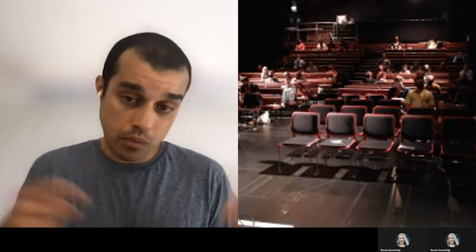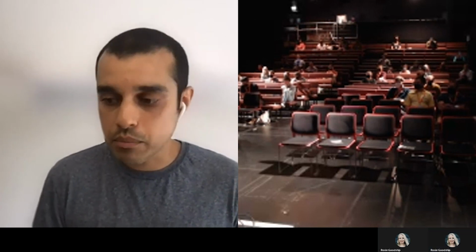That's one way. Another way is the way I described, which is literally just measuring things going through your board. How long does it take you to do anything? How long are things sitting in queues, for instance the waiting for test column, or the done column if you have a separate release column? Simply measuring those little things can be one way of figuring out your constraints. Now, if you're talking about a larger organizational view, then that gets a lot more complicated, and I think that's probably a talk in itself. So I'll pass on that bit.